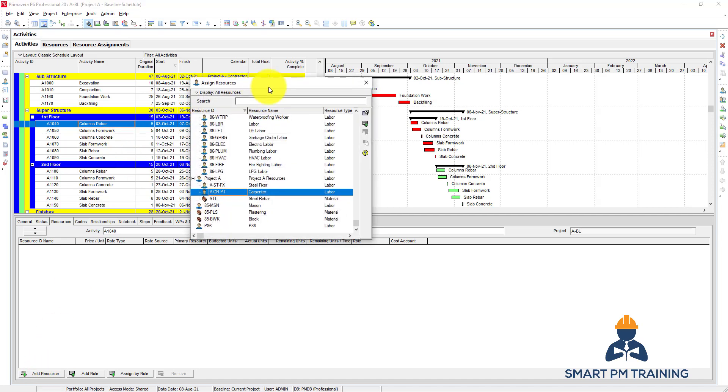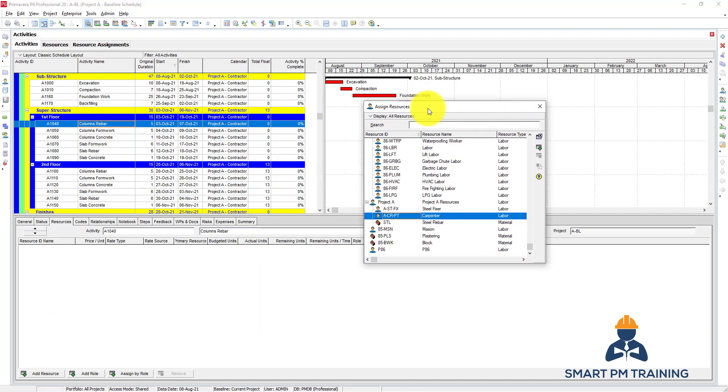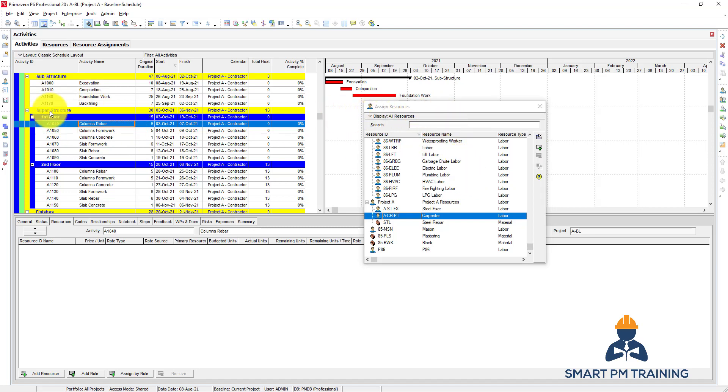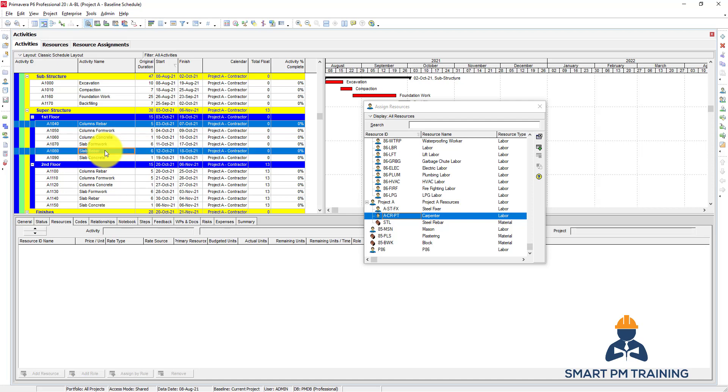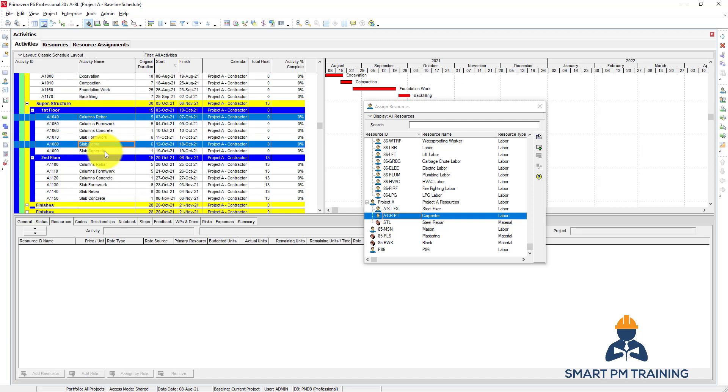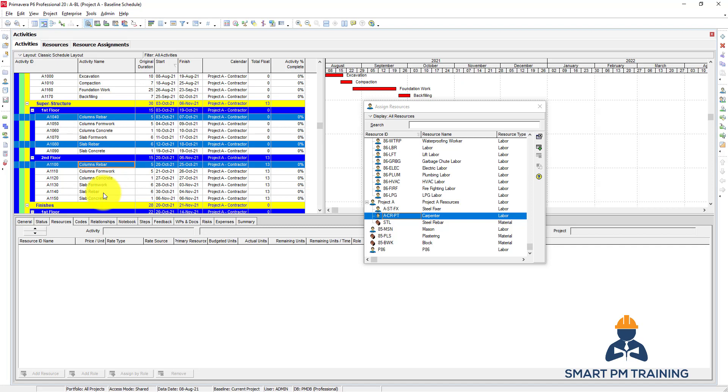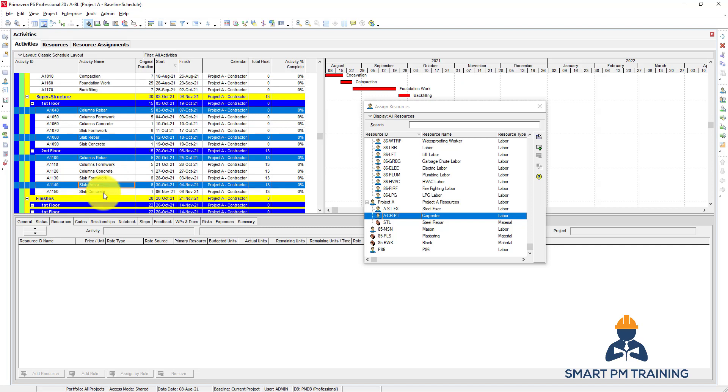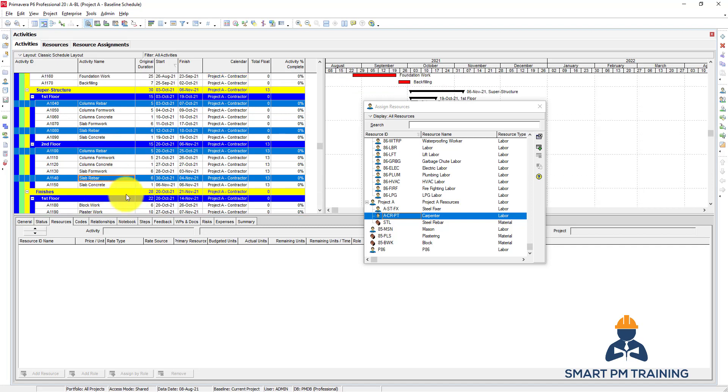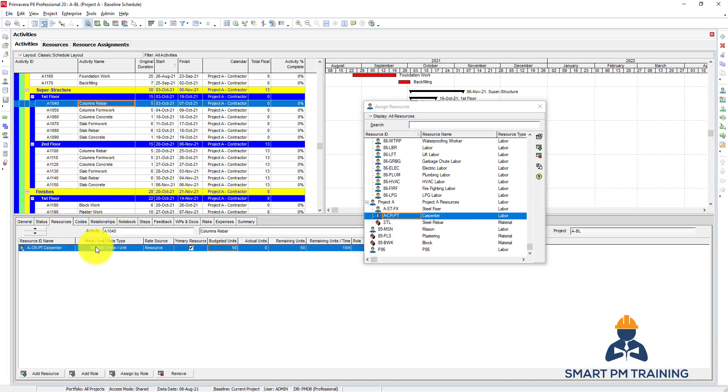There are a couple of options. I can go one by one, so I opened here the resource in a separate window. I can click on any activity that has a steel fixer resource. I click Control on my keyboard, select also the slab rebar, I have also this activity and this activity, and I make just one click so it will be assigned on all activities.